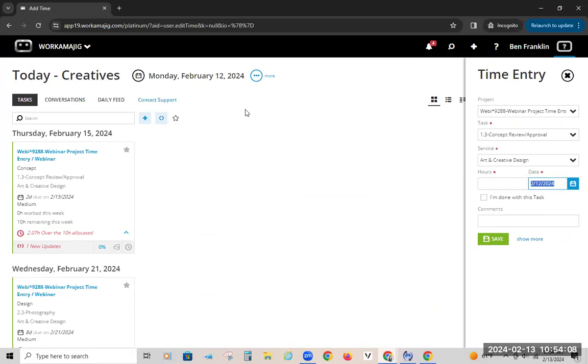I don't really mention that to creatives because I'm hoping that they do their time entry the same day, and that they put in their time daily so that my projects are accurate and my budget versus actuals are more accurate. Because if they wait till the end of the week, my budget might look great Monday through Thursday, and then all of a sudden they finally put in their time, maybe they went over all their allocations, and boom, we're way over. So try to get your people to do time at least at the end of the day, definitely not at the end of the week, because you're going to miss out on a lot and your projects are not going to reflect the most accurate information.